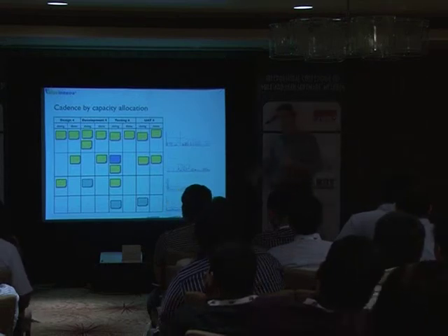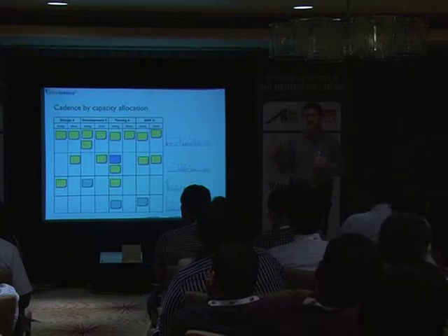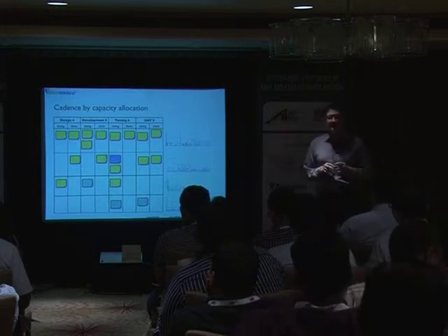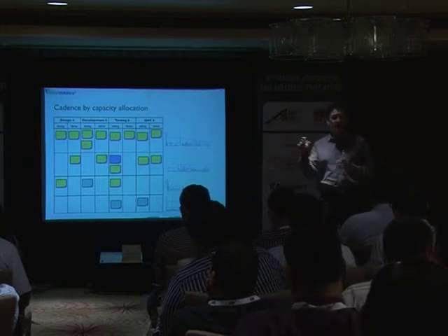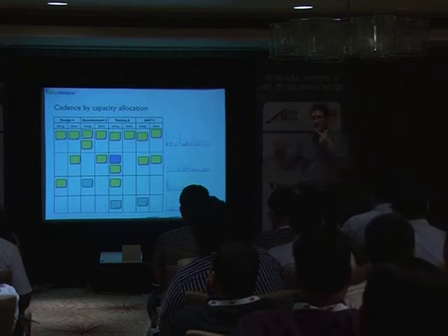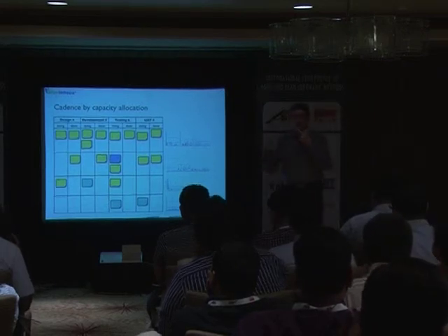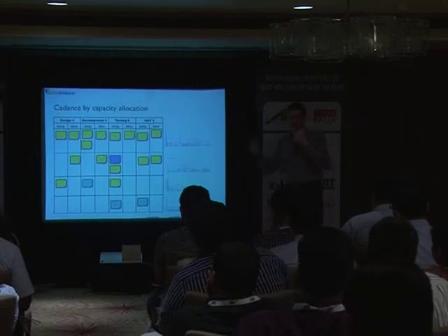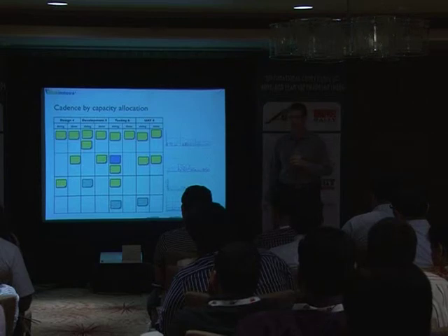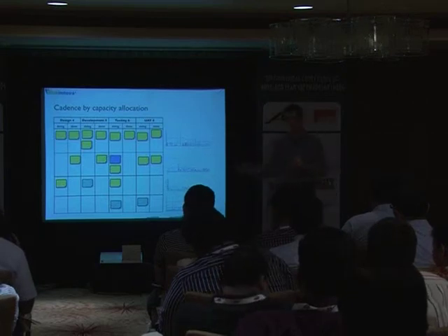We do root cause analysis, and we determine which variation that generated that urgent task can be tackled. What it is that we can do so that this kind of variation either doesn't happen or has a lower impact. So that the next time we have an urgent task that has something like this one, we can tackle it better. But then eventually, some urgent tasks will stop happening thanks to this.